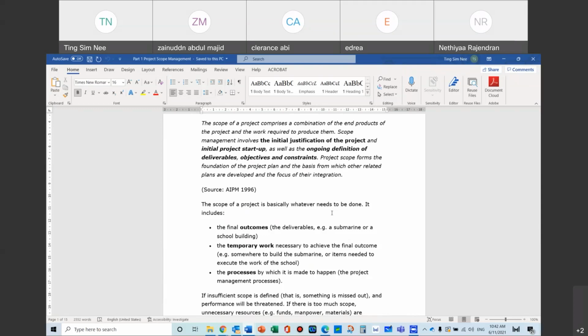You see? So in terms of project, there'll be needs. Let's say from this point to this point, there's always traffic, there's always congestion, the traffic is too slow, it's not effective, and you've got a lot of people complaining that it's actually better to walk than to drive a car during this time, on this road, etc. So you've got all these needs coming in, and then after you've done all the studies that we are going to be talking about here, you realize that, hey, we need to widen the road. So widening the road is the scope, you see? When you say we want to widen the road, that's it, you're done. You've done your project charter already.